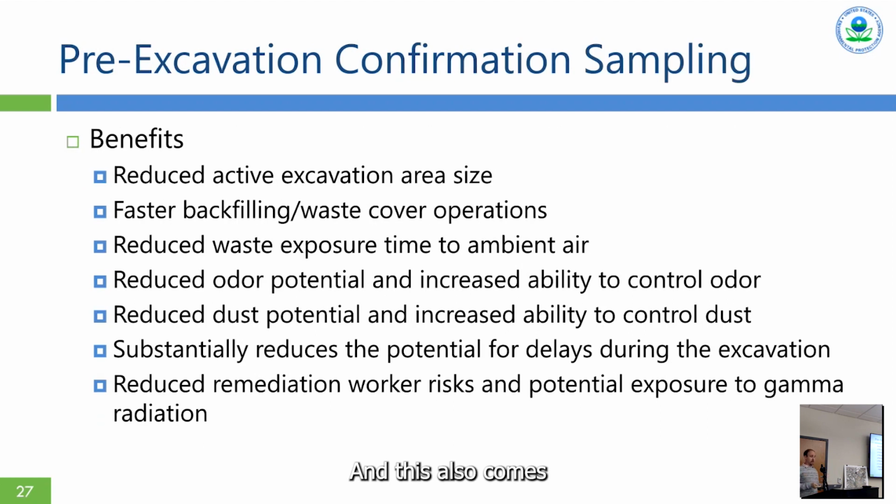And this also comes with several benefits during RA that are very similar to what we talked about with direct loading. They can continue to keep that active excavation area size small. They can get to backfilling much faster and as they go. It reduces the amount of time that the waste is exposed to the ambient air.